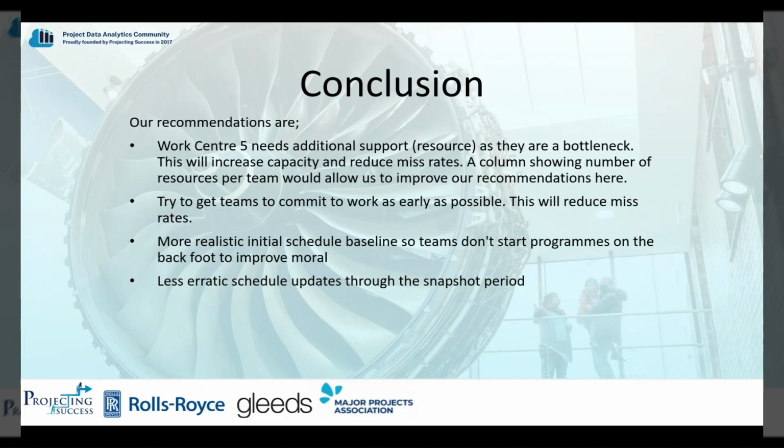So to sum up, our recommendations are: Work Centre 5 needs additional support. Try to get teams to commit to work as early as possible. More realistic initial schedule baseline so that teams don't start programs on the back foot, and less erratic schedule updates.